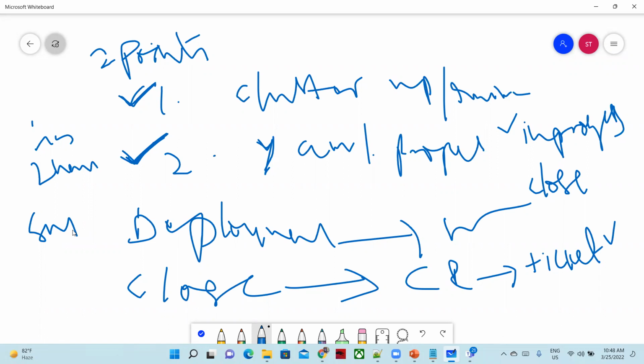Even for a failure, you have to close the ticket with failure. The status should not be closed but cancelled, because the deployment is a failure. You put a description like that and close it. Majority of the people do everything till here and at the end of the day forget to close the ticket. After 2 hours, the ticket will definitely escalate to your manager and your higher management.